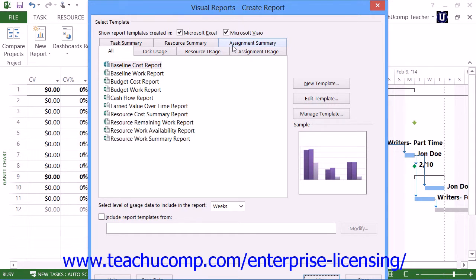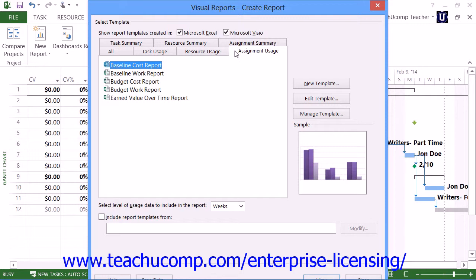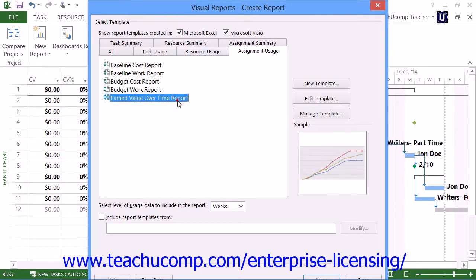In all versions of Project, the Visual Reports dialog box will appear. Note that you must have Microsoft Excel checked at the top of the dialog box to show Excel templates, and you must have Microsoft Excel installed on your computer. To open the Earned Value Over Time report, click the Assignment Usage tab and then select the name of the report. You can then click the View button within the Visual Reports dialog box to open Microsoft Excel and show the resultant chart and pivot table for the report.